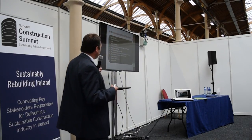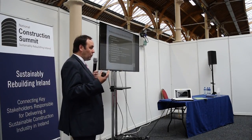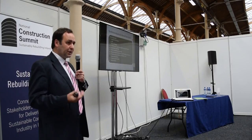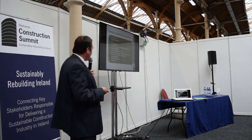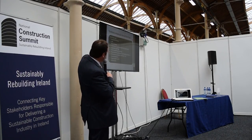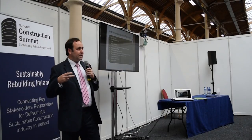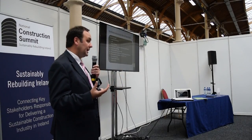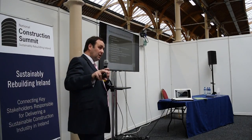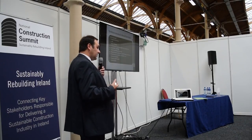Okay, the systems manual itself, and this will be for enhanced commissioning. It has a lot of the details, and it's very, very facilities oriented. So you're focusing on the capabilities of the operation and maintenance team, the guys who are actually going to try and maintain your building for you, and the operation side. It deals with what the final OPR and basis of design were, how the facilities will actually operate, the record maintenance procedures, and schedules. As I said, a lot of these are becoming soft manuals instead of hard documentation, and through the likes of the CAFM systems, they actually have QR codes on the plant, which means that when the maintenance guys come to scan it, they have the information of the correct set points and all the relevant information they need when there's a problem.